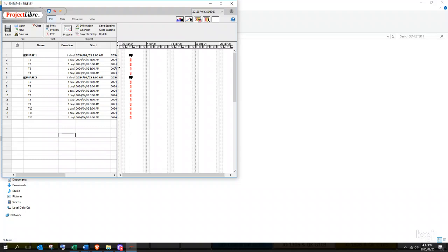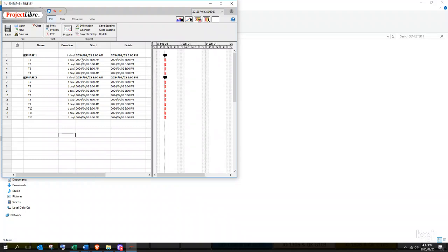From here, we're gonna punch in our start and finish time. So in this case, your start time is correct because we have set it as we're creating the project. And then your finish time for task 1 ends on the 9th. As you can see, you have a red bar on your Gantt chart, which represents your tasks, and then the blue represents your critical parts.